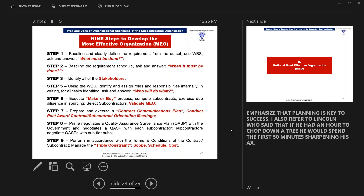Step five, use the work breakdown structure — a graphic work breakdown structure is literally a picture of what must be done. Using that, you identify and assign resources and responsibilities internally, in writing, for all tasks identified, answering the question: who will do what, and who's held responsible? You can see where there must be a coordinated effort throughout the life cycle of this requirement. It also helps you identify your subcontractors, because you execute your make-or-buy process — what can we do internally, and what must we contract out? You have to exercise due diligence in sourcing, select the subcontractors, then validate your most effective organization.